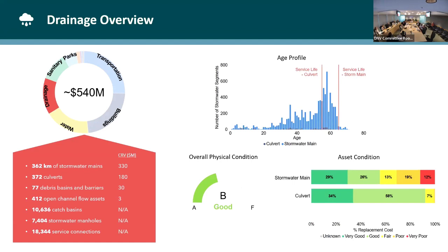Generally speaking, our asset management plans identify what is on the list that's coming up, so that starts to define the projects. But the water main replacement program is something we've embedded every year, and we know that we're going to do 4 to 5 kilometres a year because it's been a bit of a steady state. We can certainly go away and share that. It might be useful as we go to planning, to ask whether we need some increase.